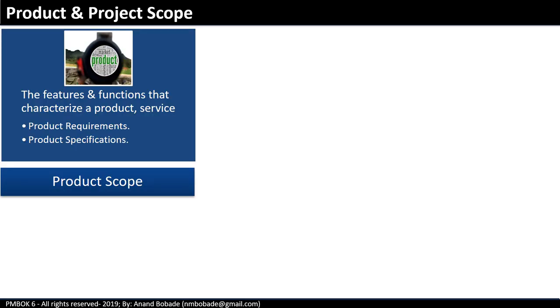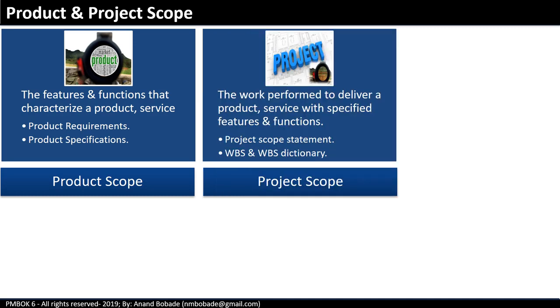There is often confusion between product scope and project scope. Product scope includes the features and functions that characterize a product or service. They are generally referred to as product requirement documents or product specification documents. Project scope is the work performed to deliver that product or service with the specified features and functions as per the product scope. They are referred to as the project scope statement, WBS, and WBS dictionary.